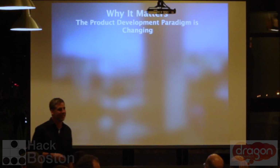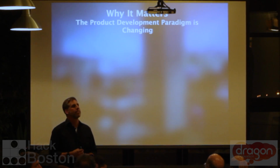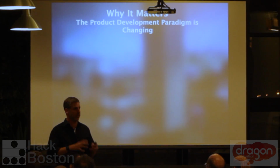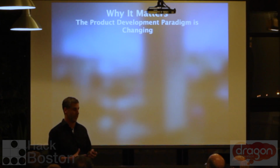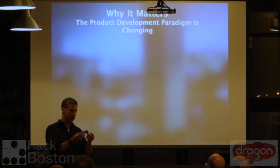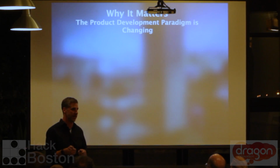Well, between the different engineering pilots, how much change, what kind of change? Did you change molds, did you change circuit boards, what did you change? Yeah, so what should happen ideally is before you start the tooling, you've got a functional prototype that works exactly as you want it to. Now, this never happens, but that's always the goal, and everybody always says, next time we're going to do that. So what you're typically changing is often the parts won't line up very well, or in some cases, the functions won't work quite as well as you want, or the buttons won't feel right. So ideally, it's just those little tweaks.